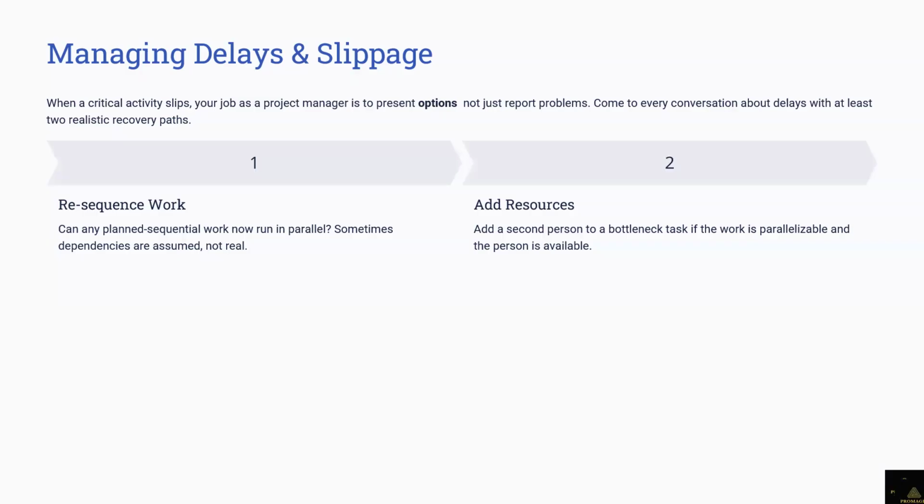So when you're submitting overtime, we're going to work an extra 10 hours. Even without showing them, they will know that. But you have to show them the 10 hours the resources are going to work. So everybody is clear, and there's nothing hidden in that. The rate of every personnel is known to the client, and you work out the calculations and you show it to them. These are things I do more often than not.